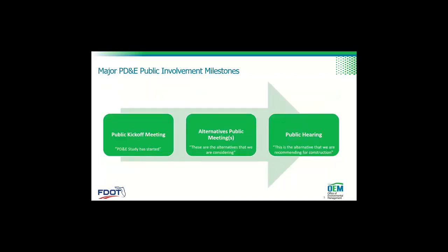Your major PD&E public involvement milestones include the kickoff meeting I mentioned earlier, which tells the local governments and communities that we have started the environmental study. Sometimes the public kickoff meeting is combined with a county or city commission meeting. Sometimes it is a separate meeting. Sometimes kickoffs are a letter. So it can mean a variety of different things.